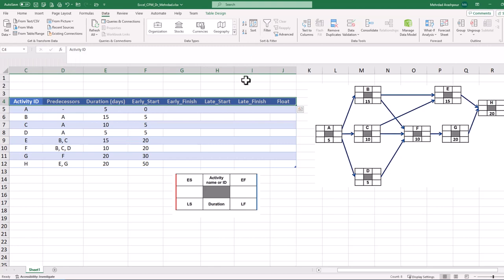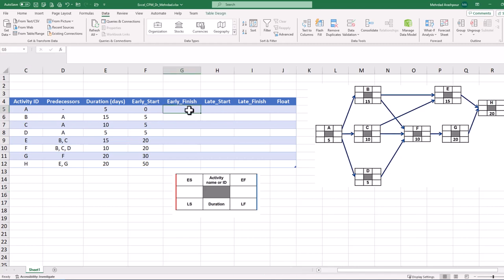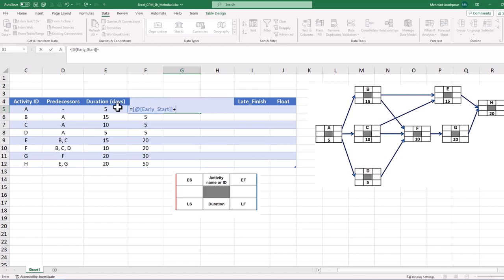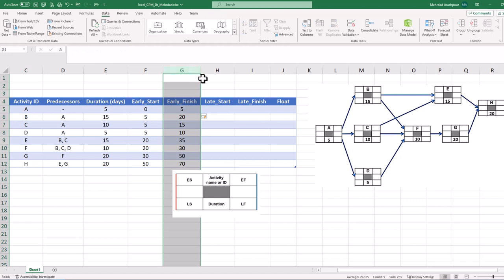The beauty of the create table function is that the @ sign symbol can be used in Excel structured references to refer to a column name within a table. Now we can easily calculate early finish dates. Click on the cell related to activity A, press the equal sign, and select the duration cell. After that, press the plus sign and select the early start cell and press Enter. You can see that early finish dates are calculated for all project activities. This concludes the second step in calculating our project's critical path in Excel.